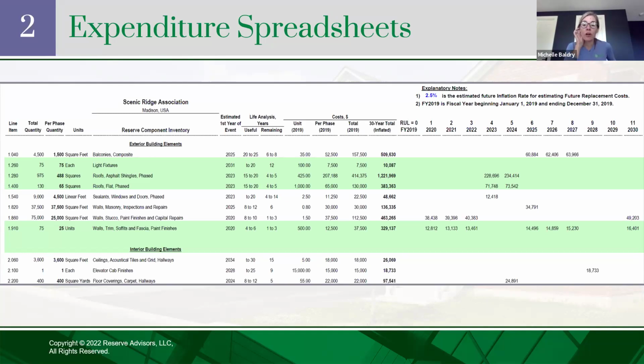One thing to keep in mind is if you are deferring projects, they don't go away. This is especially big in Maryland, where you're required to fund it. For the reserve account, people will think, well, the balance says we needed to have $60,000 and we actually have $90,000, so we don't need to contribute to reserves next year. Well, no. If you have $90,000 because you've deferred or pushed out a $50,000 project, it's not that you have a surplus right now, right? Because you still have this liability or expense in the near term that's going to happen. So I think that's one thing to keep in mind: as you defer projects, make sure they stay on your radar.